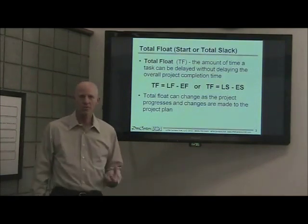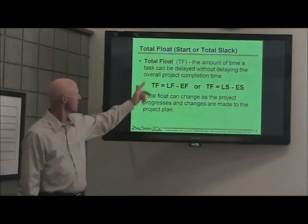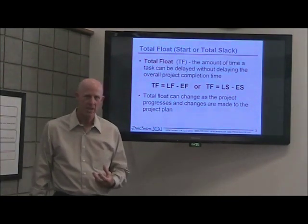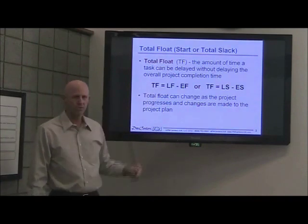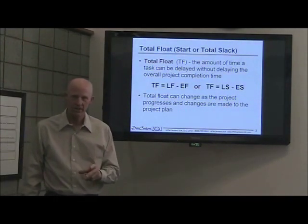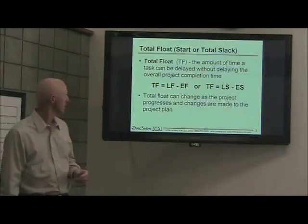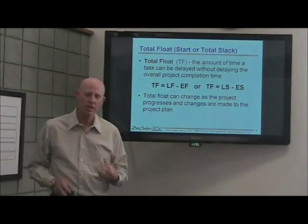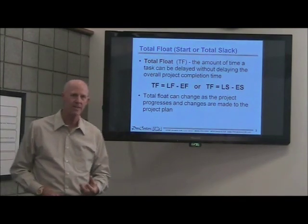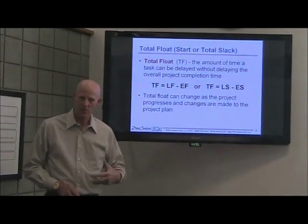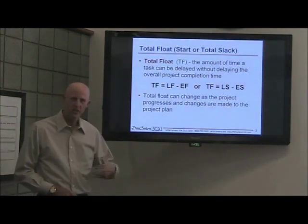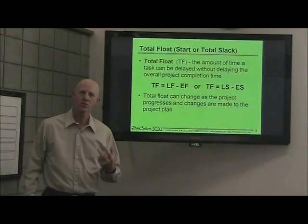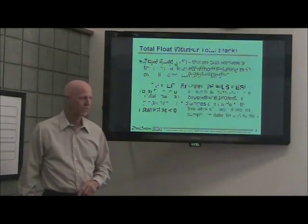Let's talk about the two terms. Total float, by definition, is the amount of time you can delay a task without delaying the project completion date. The calculation for total float is the late finish minus the early finish, or the late start minus the early start. Total float will change as you do schedule updates because, as you change the durations or the actual dates, all the calculations will be updated and your total float values will change as your schedule changes. They are not static values.